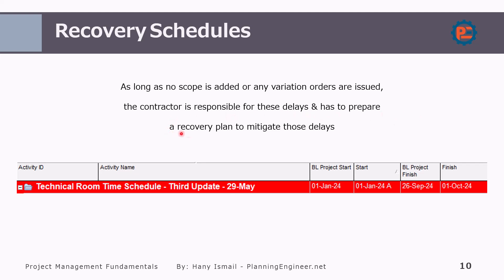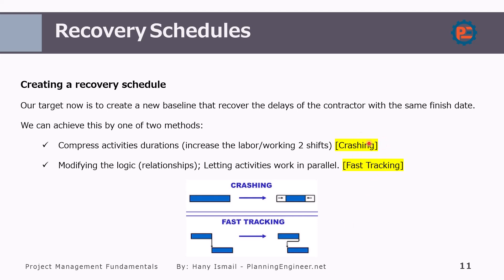The contractor has to prepare a recovery plan to mitigate those delays. There are two ways to do recovery scheduling: crashing and fast tracking. These are the main two techniques. Simply, crashing — from its name — means reducing the duration of the activity, while fast tracking means working in parallel on the activities.